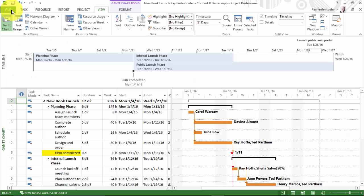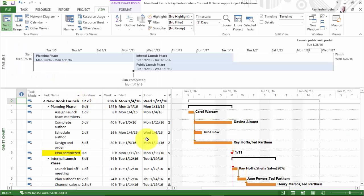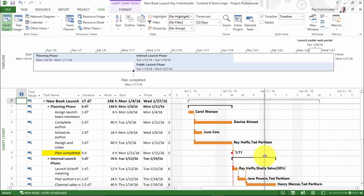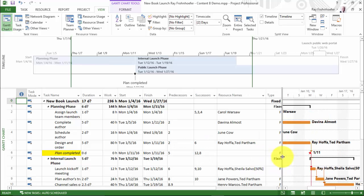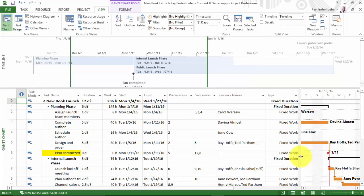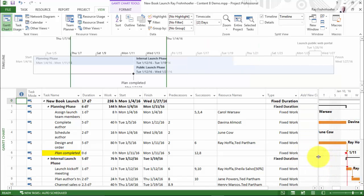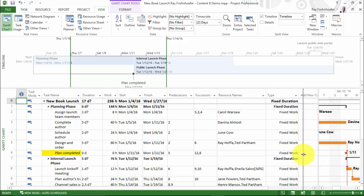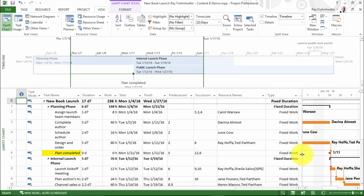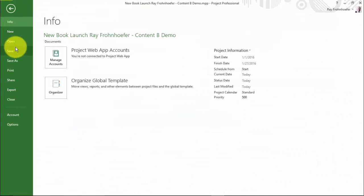So let's go back again and let's suppose that I want to print all the columns of the entry table. I can pull the pane way over. And we'll just set it there. And now when I choose print, it will go all the way through the type column.